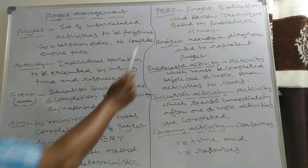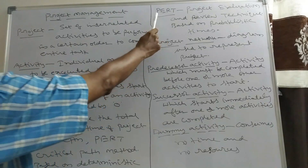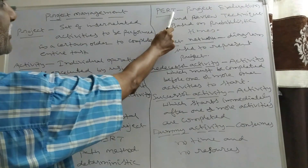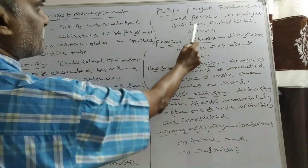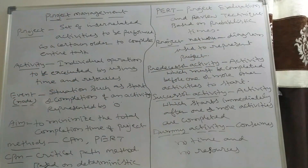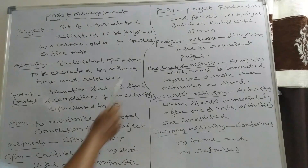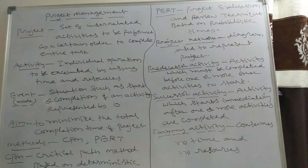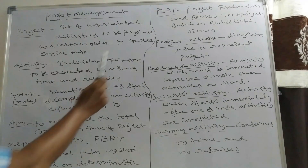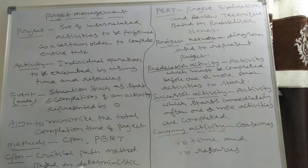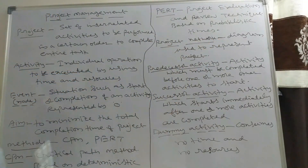PERT is Project Evaluation and Review Technique. It is based on probabilistic times — meaning judgment or guessing. PERT is used in research projects and similar projects. The main difference between CPM and PERT is that CPM is based on deterministic times, while PERT is based on probabilistic times.